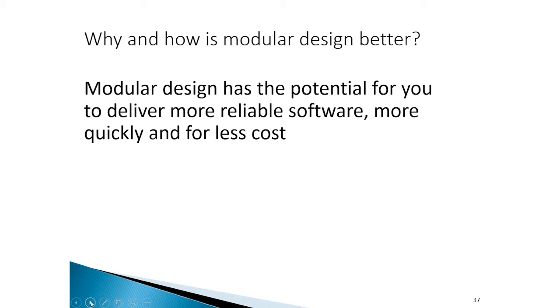So one of the issues that we've had with traditional waterfall and monolithic software procurement and technology procurement is that we build all of this functionality, and then only at the end do we get the first real chance to test how all of that software works. Only at the end do we start integrating it all, and only at the end do we start being able to test how all of that integration works.